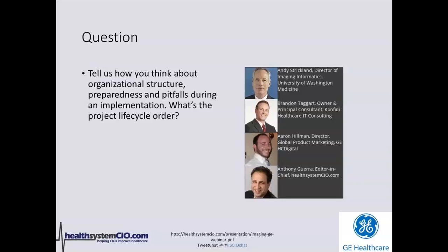In terms of governance, that obviously comes right around the same time, making sure that's clearly established and everyone's roles within the project are clear. Then moving into an actual discovery and assessment of looking at what you really have, what you can utilize into the future, and what just downright needs to be replaced. And making sure you're looking at both the clinical and the technical components associated with that.